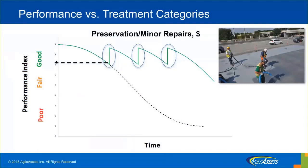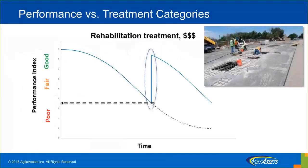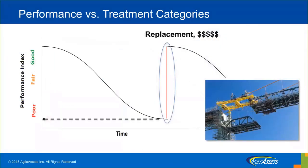Preservation or minor repairs — which are low cost and more frequent actions — happen when the bridge is still in good condition or falling from good to fair. Rehabilitation treatment applies when the bridge is in fair condition and falling to poor — it is more expensive than preservation or minor repair. The last one is replacement, when it's too late to fix the bridge and we have to spend a lot of money to replace the whole bridge because it is already in poor condition.